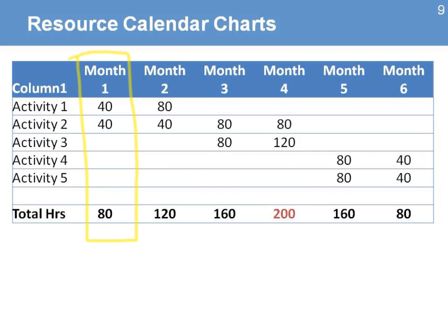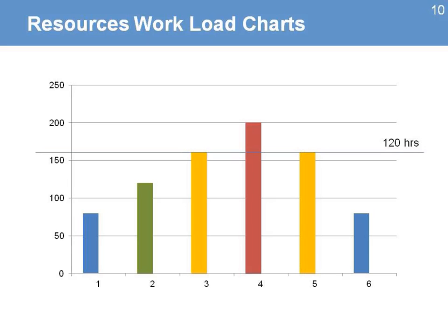Eventually you will have that information for the whole year or the duration of your project, and you start adding up all those totals, and you're going to be able to identify some that are beyond what is normally physically possible. That is the usefulness of this chart: once you identify those levels, it is important that during that time you don't over-allocate the time available to a team member.